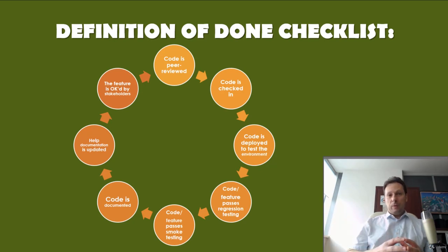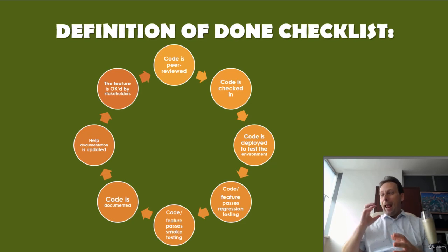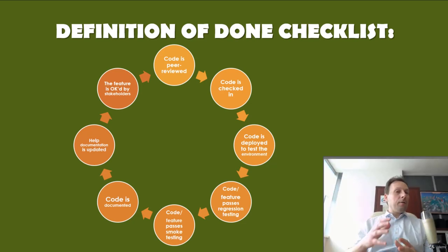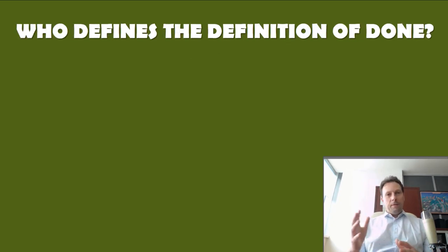If multiple Scrum teams are collaborating on the product, they must mutually define and comply with the same definition of done. Different companies and development groups will come up with their variants, but they all track back to the same ideal: the code does what it's supposed to do and does not break anything else. Making every feature, release, or sprint go through these steps to ensure done is important to ensure consistent quality and completeness.